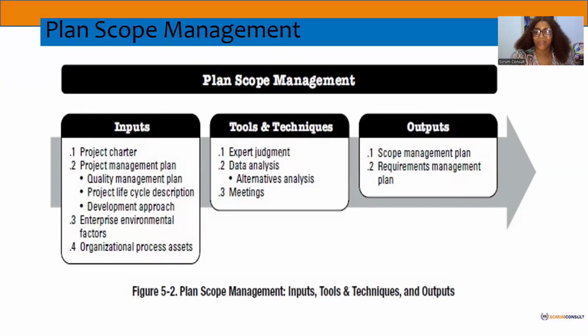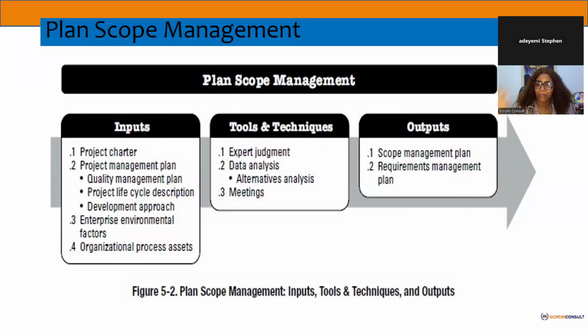So it comes as an agreement for the team, right? For us to make sure that these documents are sent in for approvals, so that they can come in and we can start working on it, because the organizational structure and culture could cause delays. So if you did not consider these things at the point of your plan, it might be difficult when the work starts. So when you are creating a scope plan, everything that is not within your control as a project manager, as the project team, you must be able to create and make plans for that.